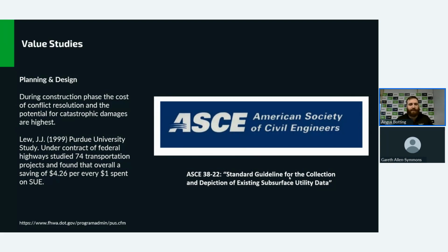Majority of the work out in BC at the moment for SUE, especially working under ASCE, is done during the construction phase by general contractors. And these general contractors are knowingly doing them to prep in advance of change orders. So what we're trying to encourage through this webinar series is moving those studies into the owners or design phase before construction crews are mobilized.